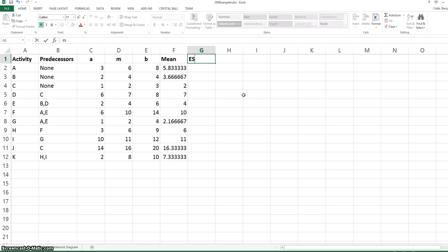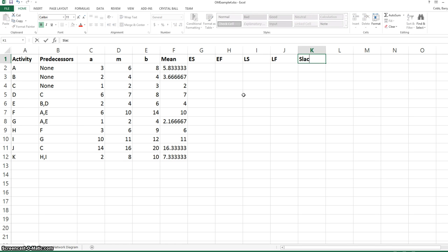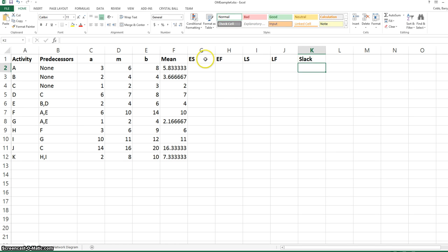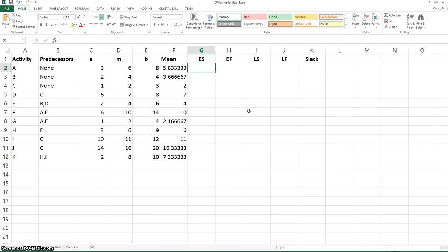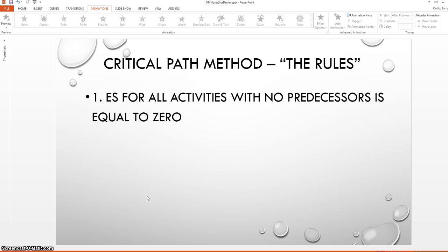Finding the critical path involves calculating the earliest start time, earliest finish time, latest start time, latest finish time, and slack time for each activity. There are six rules that govern the calculation of these times. The first rule is that the earliest start time for all activities with no predecessors is equal to zero.